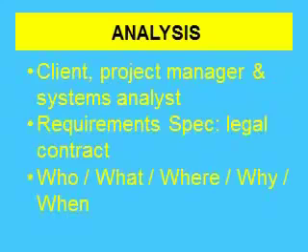And we go through each of the stages and say who's involved in each one of these stages and some key things to remember from each stage. So in the analysis stage, you've got your client, project manager, and system analyst all involved, and you should know some of the responsibilities for each of those. What is generated at the end of the analysis stage is a requirement specification, and that's the legally binding contract between the client and the software development company.